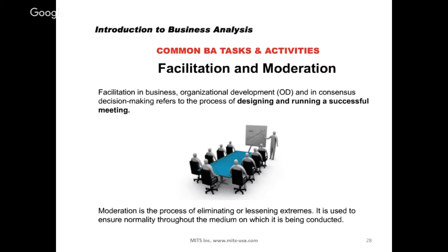That's our common quick answer, but from an ACP Agile perspective, consensus is actually majority. We are going to find some people that will say consensus has to be unanimous, but it's actually more common that consensus is majority.